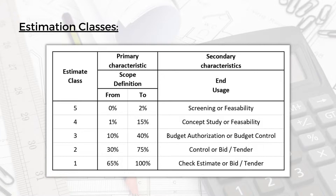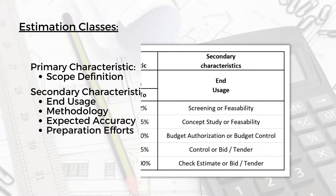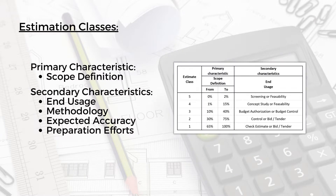Class 1 has scope definition between 65% to 100%, and the end usage will be check estimate, bid, or tender. The scope definition refers to the drawings, specifications, and all the project information needed to produce an accurate estimate. If this information is not available or not defined enough, you cannot produce a class 1 or class 2 estimate, but you can produce class 3, 4, or 5. The primary characteristic is the scope definition — how well the scope of the project is defined and what level of information is available.